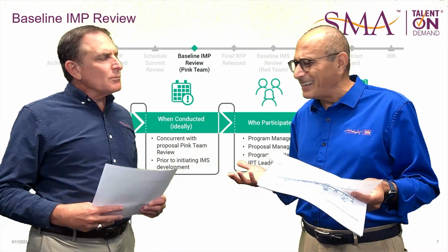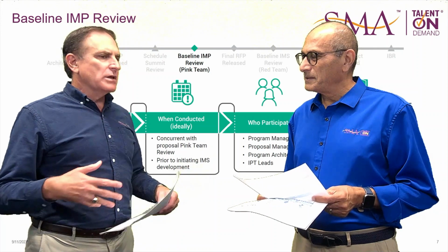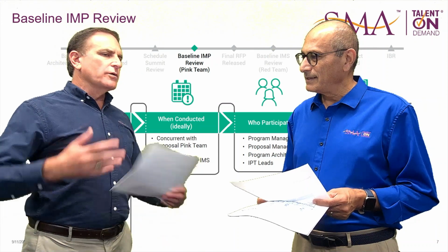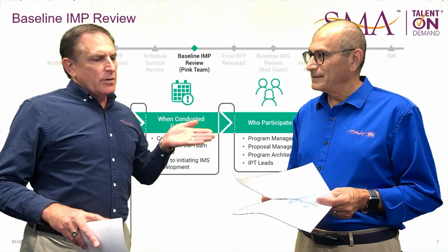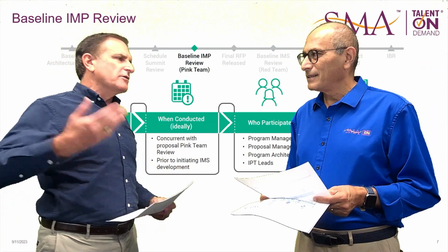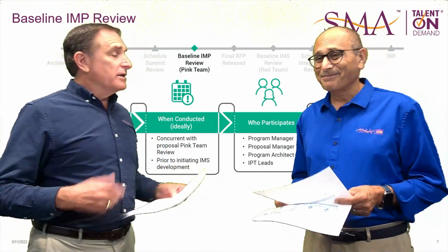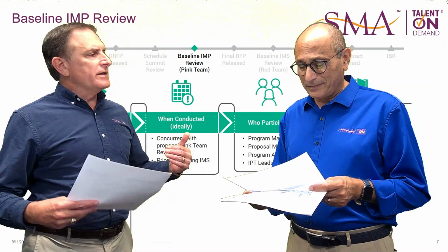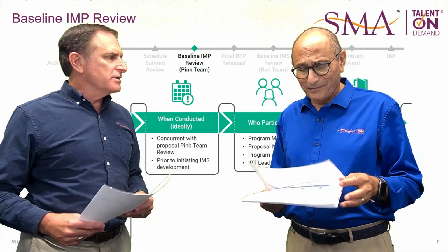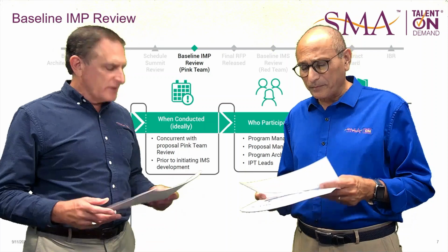So what do you mean by that? Well, you want a common language that runs throughout the proposal, as well as throughout the IMS itself. So you don't want to say PDR complete in one place, then PDR finished, CDR complete. So it's a matter of standardizing a set of verbs. And the customers probably appreciate that. Absolutely. And ideally, if you provide that set of verbs to the customer as part of your submission of the IMS, it helps them understand what you're talking about when they're reading it.